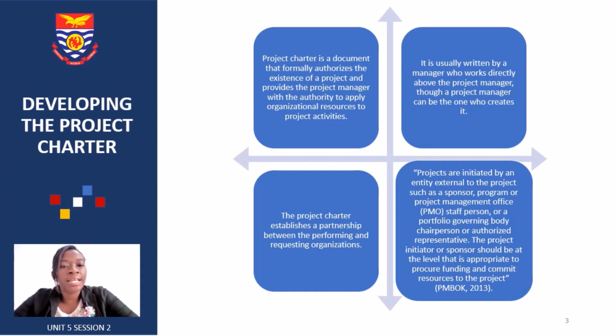Like I mentioned in the earlier session, the project charter is the document that authorizes the existence of the project, and that is what provides the project manager with the authority to apply the organizational resources to that project's activities. So the project charter is essential for any project. It is usually written by the manager who works directly above the project manager, though a project manager can be the one who creates it, but usually the one the project manager responds to is the one who does the project charter.